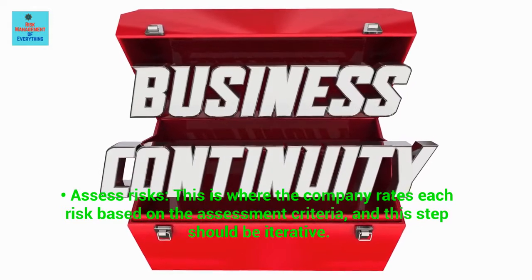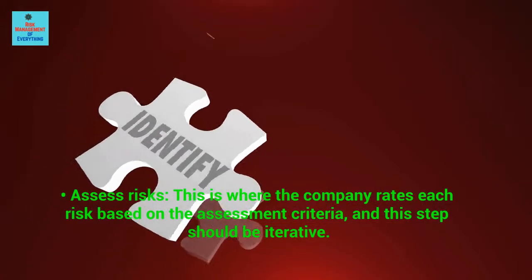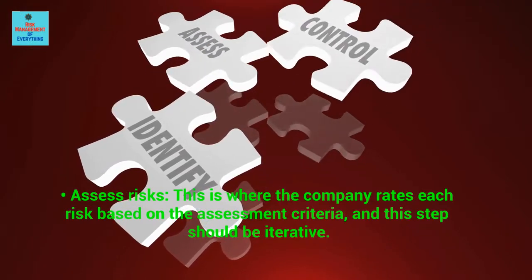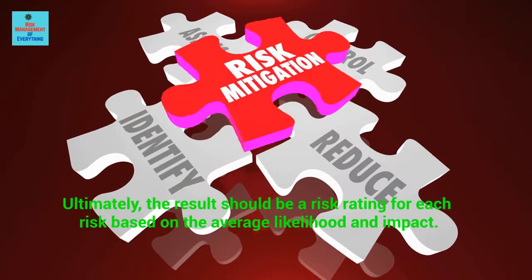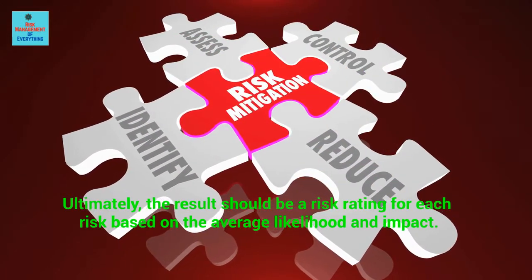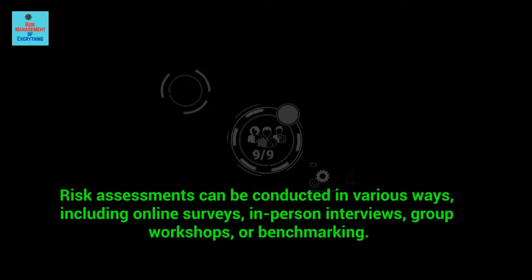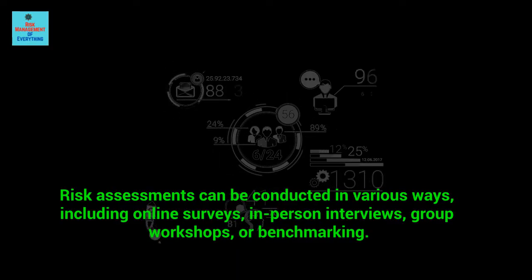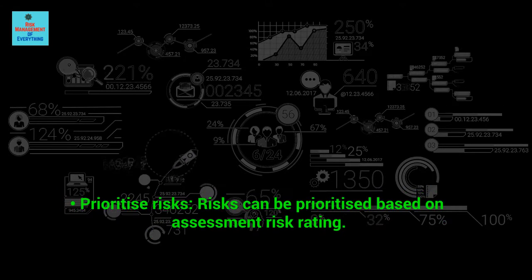Assess risks. This is where the company rates each risk based on the assessment criteria, and this step should be iterative. Ultimately, the result should be a risk rating for each risk based on the average likelihood and impact. Risk assessments can be conducted in various ways, including online surveys, in-person interviews, group workshops, or benchmarking.